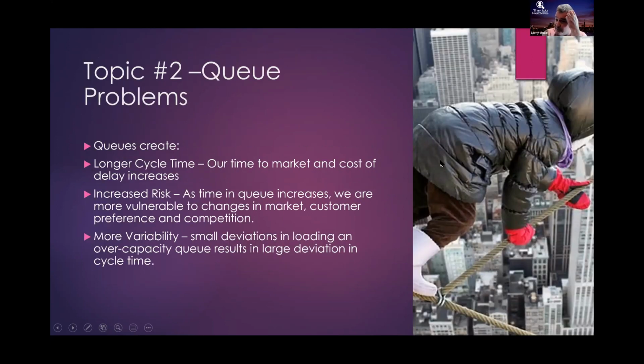Here are some other problems with queues. Queues, and especially long queues, and not having an understanding of queuing theory, lead to longer cycle time. So our time to market and cost of delay increases. That's the main big problem. But it also increases our risk.